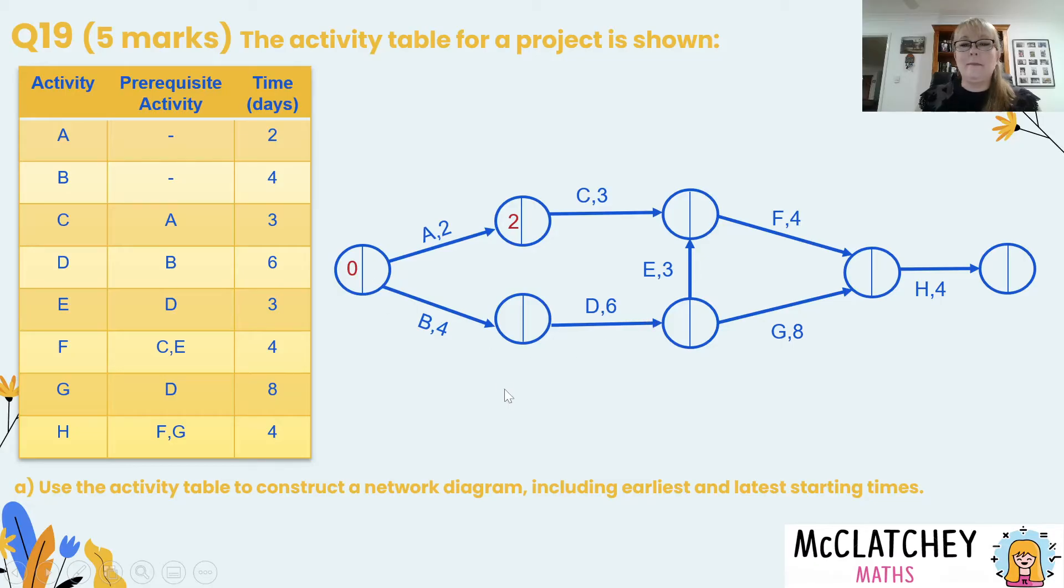Well following along the pathway of A I'm going to add two days and that goes into the left hand side of that vertex. Now I'm not going to keep moving along that pathway because as you can see my next vertex has two pathways coming in so I need to make a decision at that point. I can't make that decision until these vertices are filled out first. So let's go along the bottom pathway now with B we're going to add 4 and then with D we're going to add 6 plus 4 gives us 10.